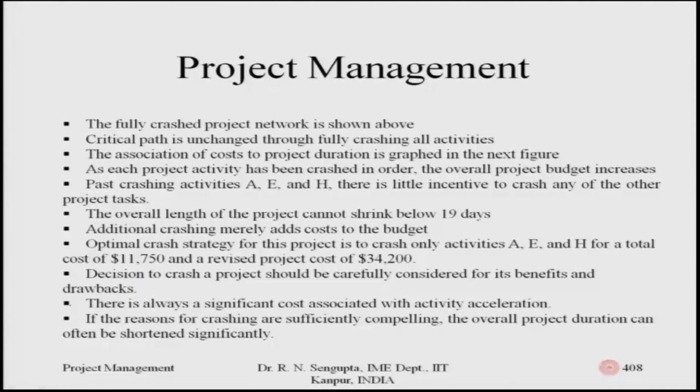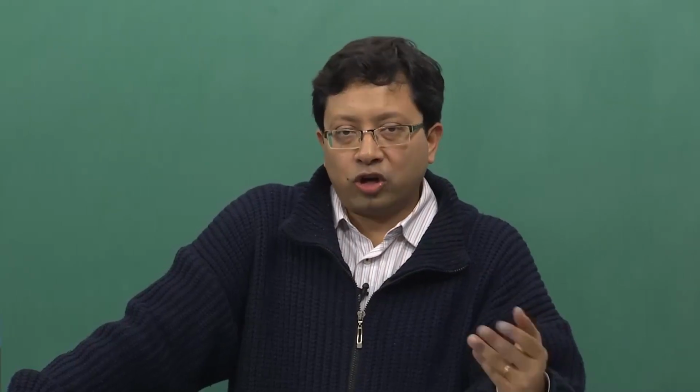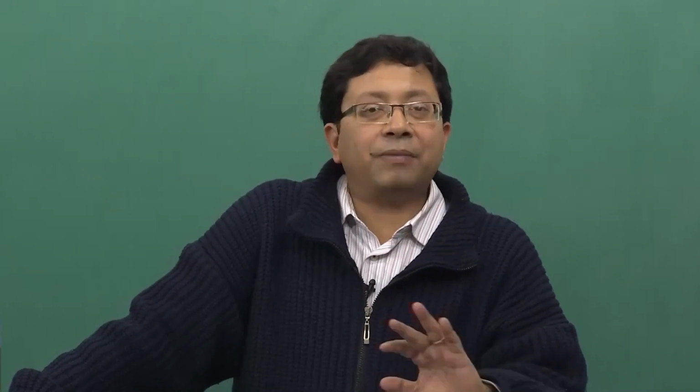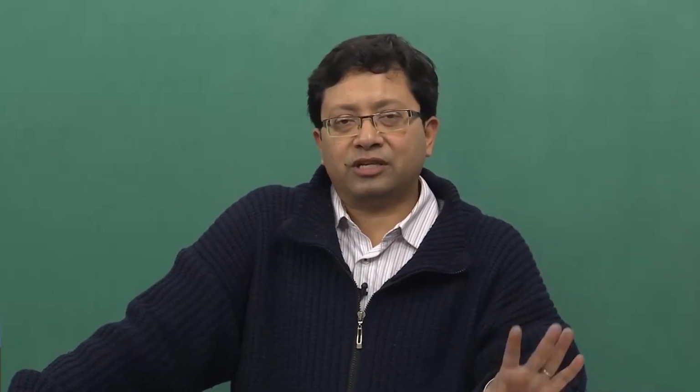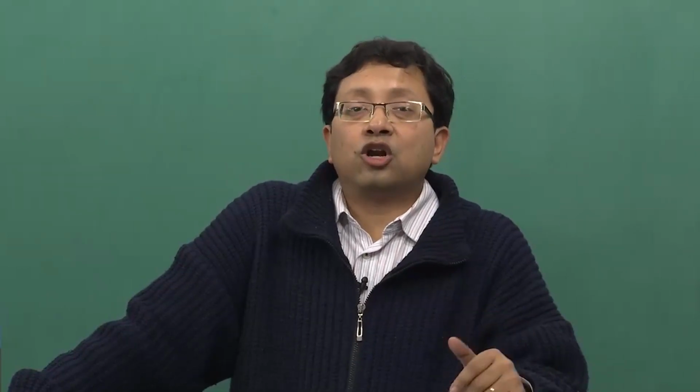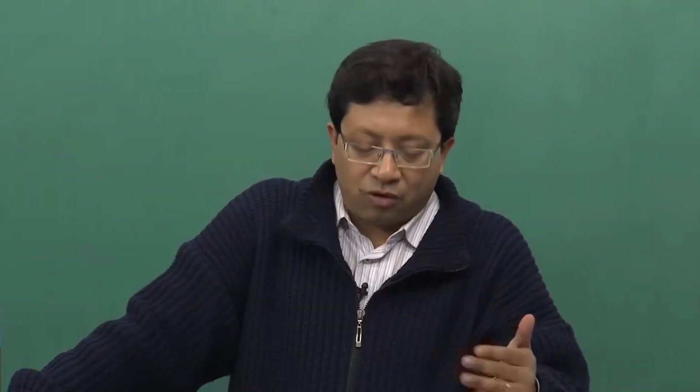Now, if you remember I did mention qualitatively that your choice of which set of activities, apart from the practical notion or your experience, you will take one at a time such that it makes logical sense to reduce the number of days for crashing a particular job such that the overall increase in the total cost happens in the least possible manner.